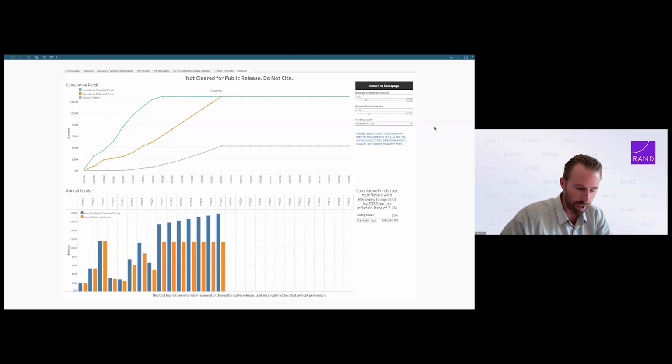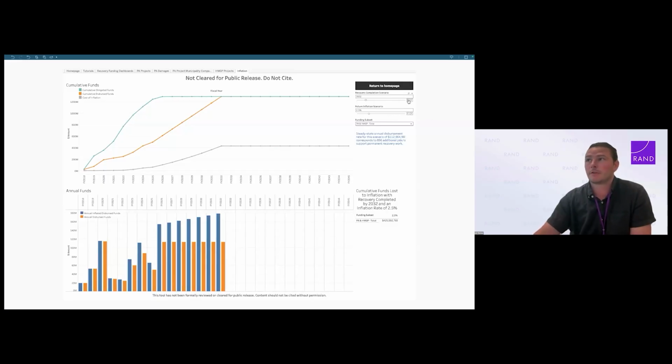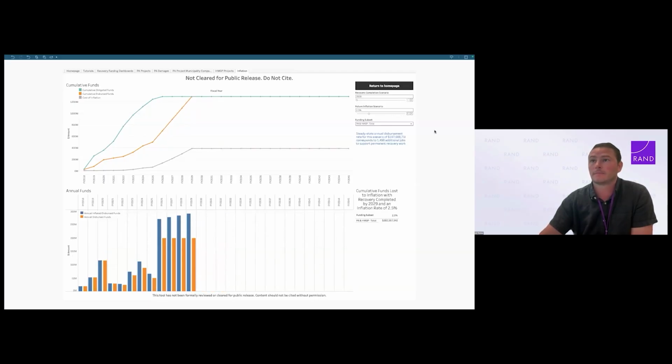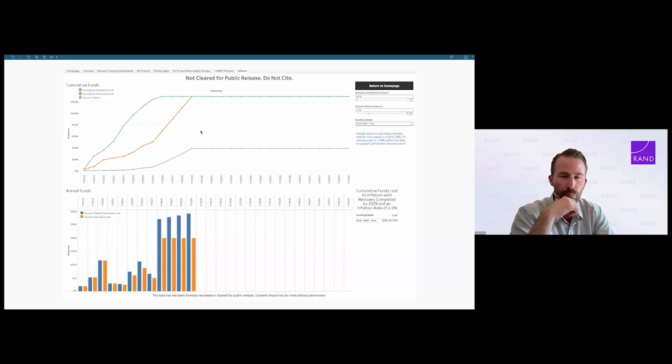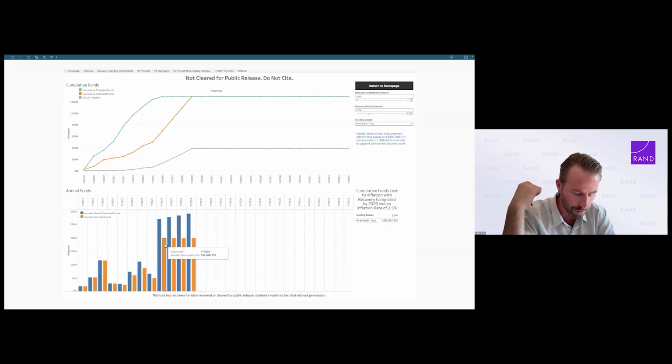Now, Devin, let's see if we can do a little better and pull this up to 2029. So accelerate by 3 years. Okay, so we'll adjust that first filter up here from 2032, and we'll move back to 2029, see how things change. Okay, so you can see how much that orange line, the slope of that increased. So we've got to dramatically pick up the pace of work to the tune of almost 200 million per year, as opposed to, I think it was 125 in the last one.